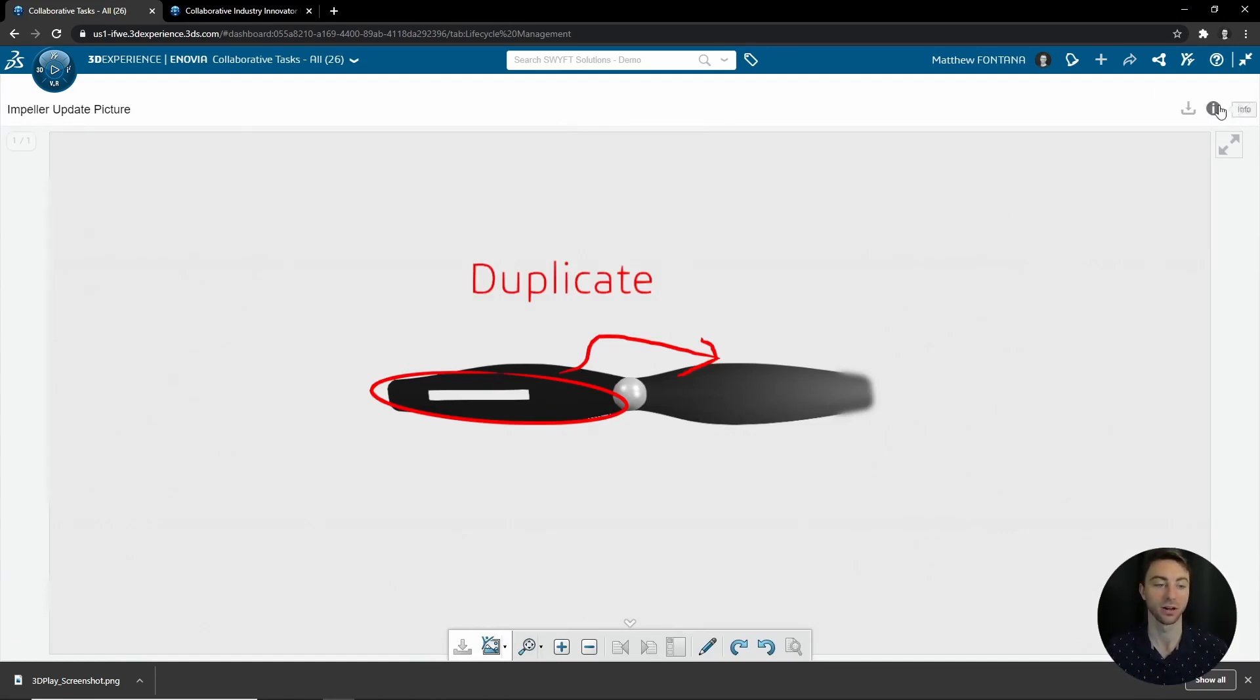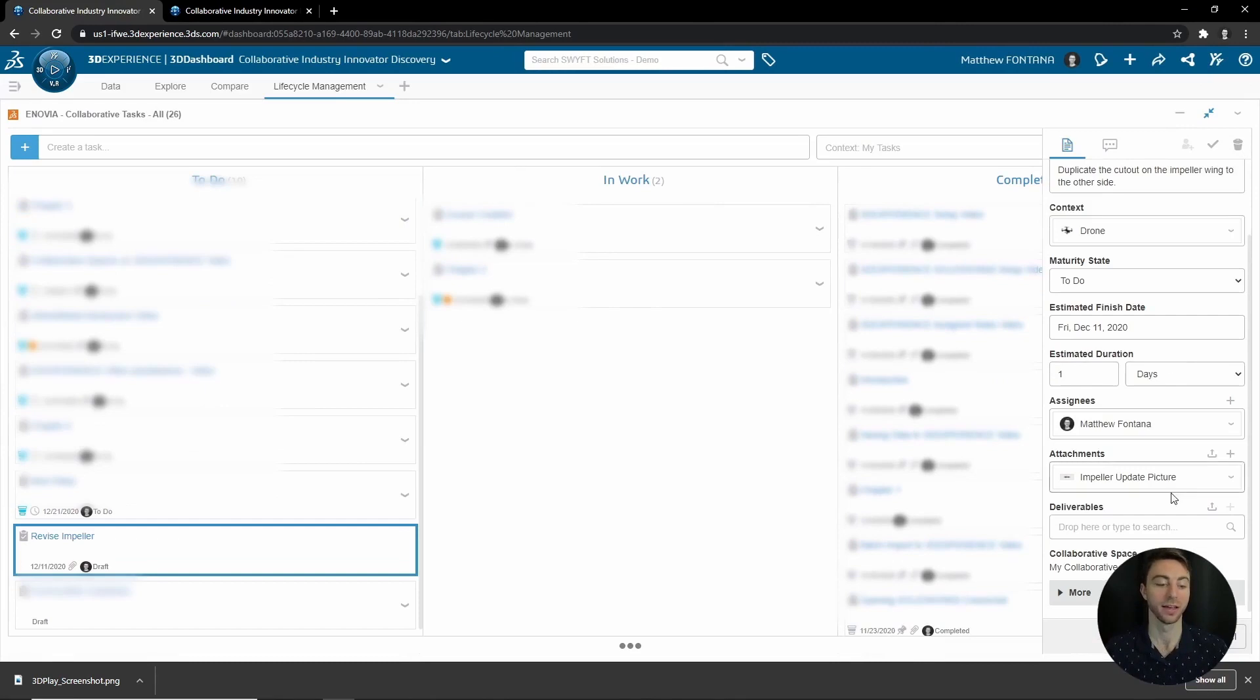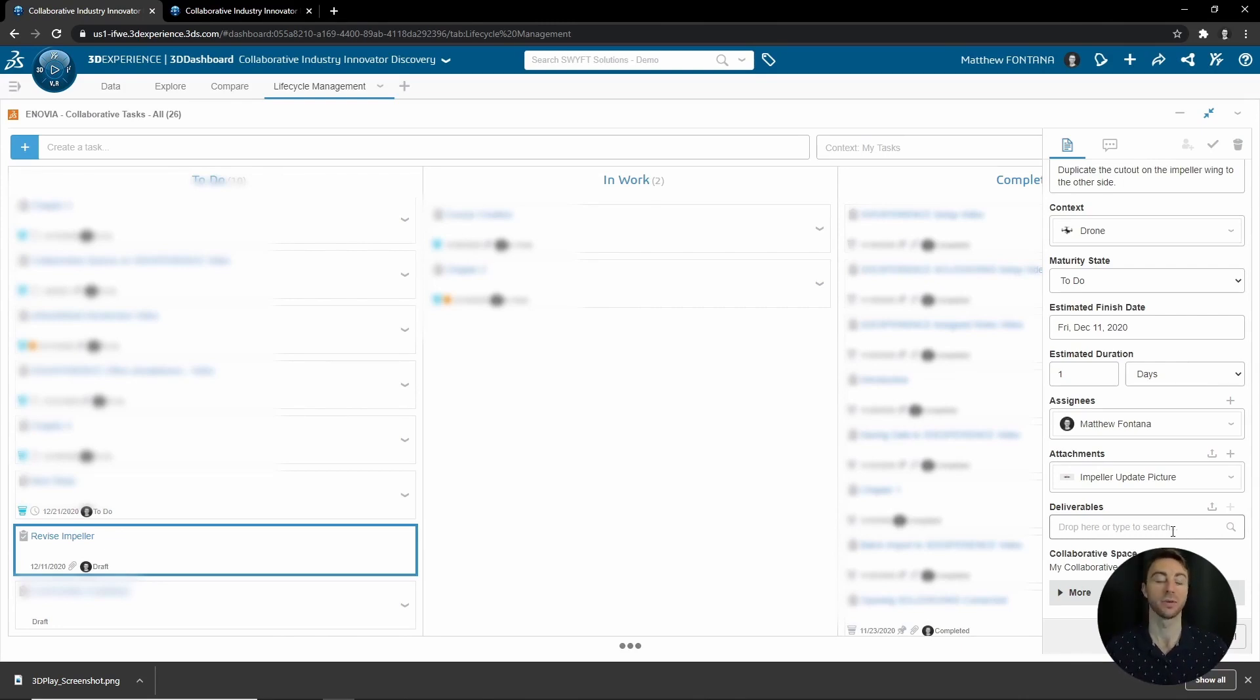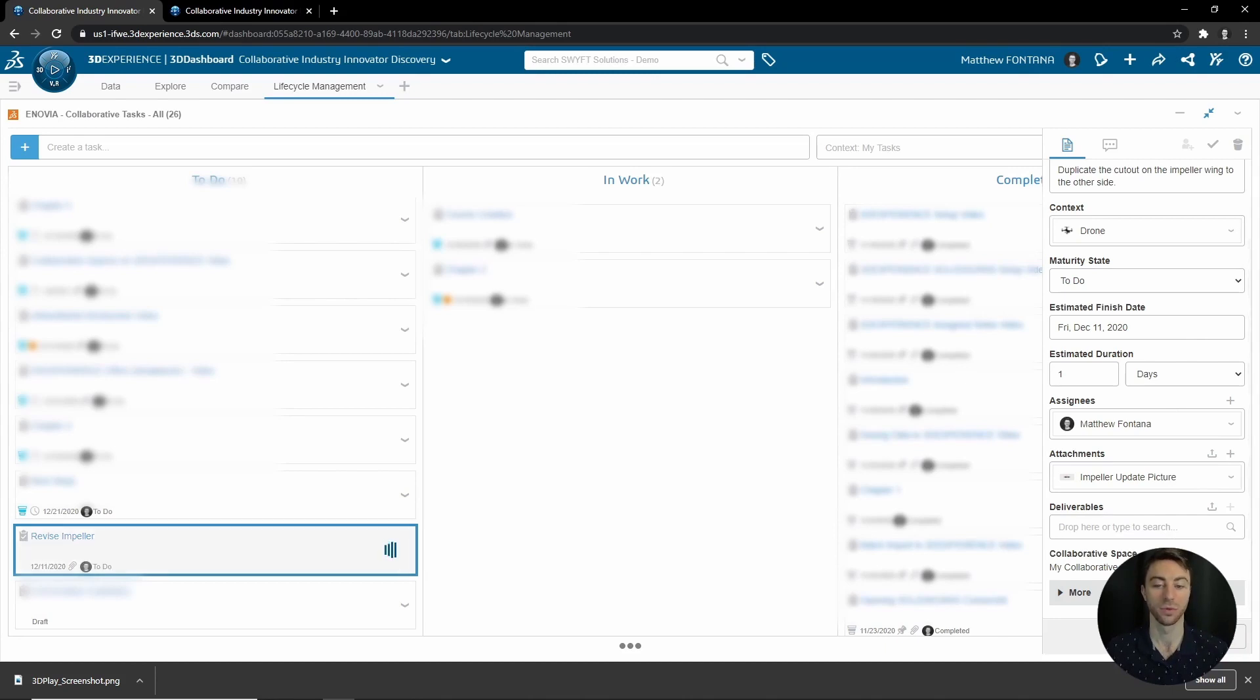This is just an example of what you could add as an attachment for more context, such as a markup. You can add other documents, other products, anything like that. And then Deliverables is left blank because the assignee has not gone through and made the changes. Once they have, they can attach the updated impeller to the deliverables and then it can be approved and completed.